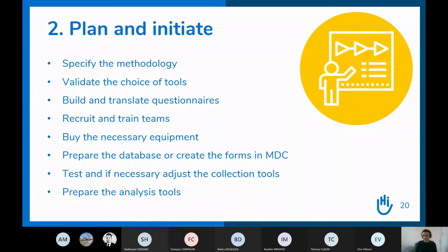But you also have to make sure that people who are less concerned by all this will still understand the form, and will still be able to answer the questions in the right way. So maybe what you can do is at least test it on other staff of the project, and if possible, even go on the field and test it with real target people for this data collection, but just a small sample, and you know that these answers are not going to be taken into account.